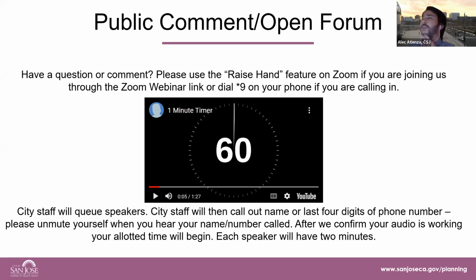And then actually one other last item I'd like to point out was a lot of comments regarding noise. So with regards to noise, we will be reviewing a noise study, and that will consider both the general plan noise policies as well as noise related to the San Jose Municipal Code. So both of those will be factored into both the EIR as well as the review of the conditional use permit. Anything else on the city staff?